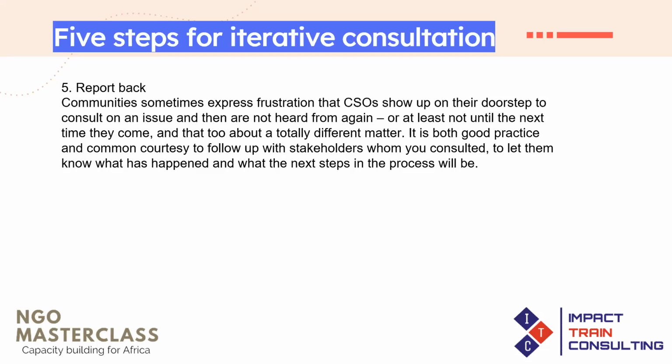That's very critical, because a lot of times I've seen situations where you go to communities to consult them and women are not there. It's your duty to ensure that more women are brought into the room to discuss. You need to deliberately go out of your way to get women to participate in the project, because women will not participate when men are there. Women are not going to talk when men are there. Our society has a lot of patriarchy in it. And so you must go out of your way to ensure that women participate, either by holding separate meetings for women and separate meetings for men.